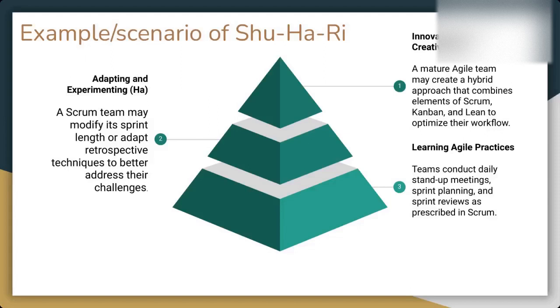The team conducts the usual stand up meeting, let's say for 15 minutes, and follows the format for the daily stand up as per the Scrum guide. What does the Scrum guide say about the daily stand up? It says you ask three questions, right? What have you done yesterday, what will you do today, and are there any impediments or blockers, right? So that's the format, and that's what this team follows as it is as per the Scrum guide.